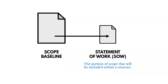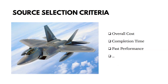The procurement statement of work is a portion of the scope baseline pulled out to include in a contract — it defines the work we want an outside vendor to perform. Source selection criteria — the way we score and rate sellers — are based on things like overall cost, completion time, past performance, and so on.